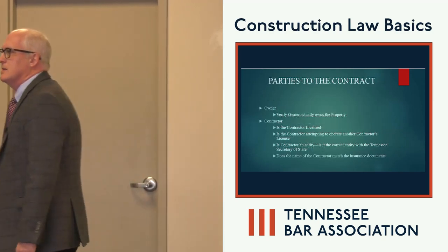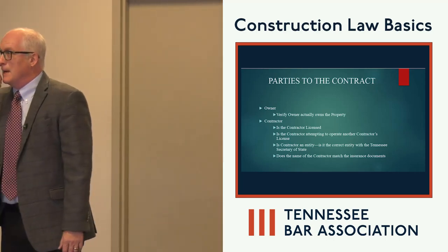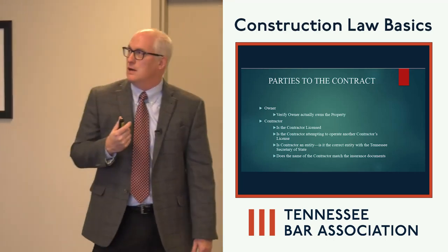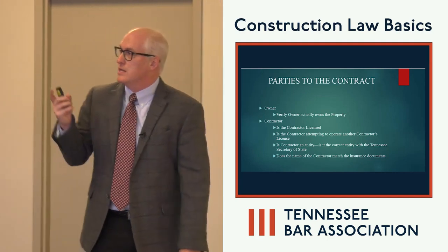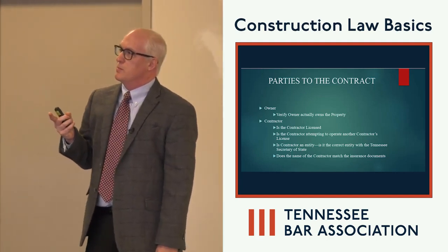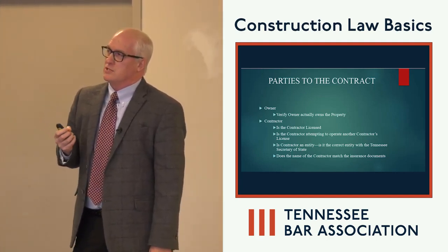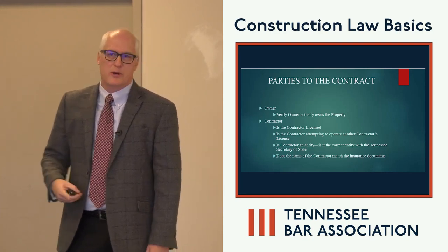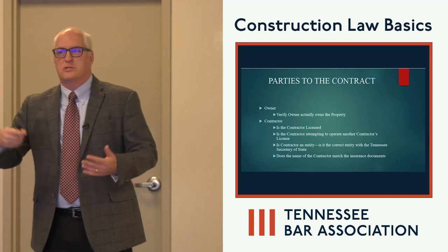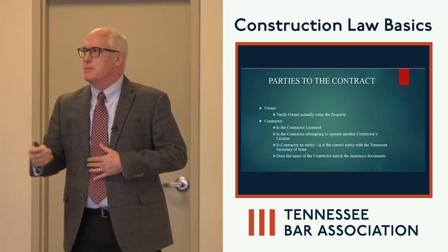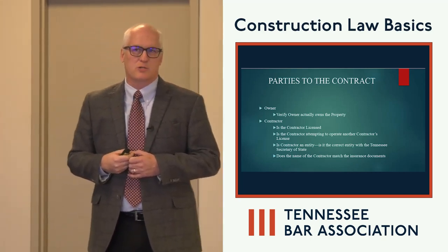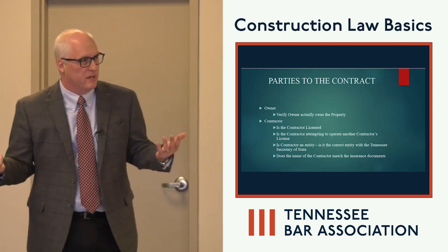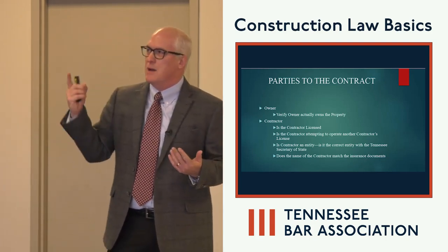Parties to the contract, again, what seems to be a very basic concept may not be in actuality as far as when you start preparing the document. If you're a contractor, I've had contractor clients come in before, say they're going to build a house on a piece of property. You pull the tax card, do some title work, whatever the case may be, and come to find out that the person you're building the house for doesn't even own the property, which could be a real issue. This happens a lot.